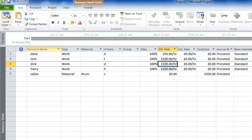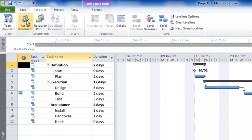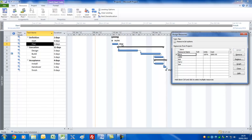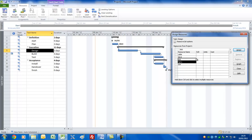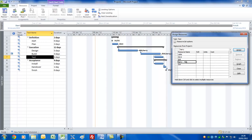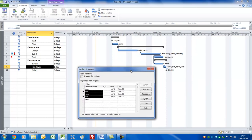Let's go back and look at the Gantt chart view and assign the resources to the tasks. Click the Resource tab and click the Assign Resources command — this gives you an assign resources box. Click on the Plan task, click on Dave, and click Assign. Dave's name appears to the right of that. For Design, let's put Dick and Harry on that — select those and press Assign. For Build, we'll have Dick, Harry, and Cable. I'll hold down the Control button to select non-contiguous resources and assign them — for the Cable, we'll have three drums. For Test, Tom and Harry — press Assign. For Install, Dave. For Handover, we'll have everyone apart from Cable. That's how easy it is to assign resources.